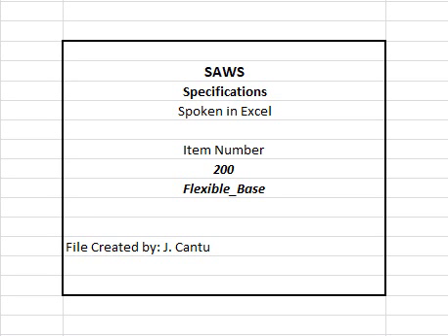200.7 Measurement. Flexible base will be measured by the square yard, complete in place, for the thickness specified in the contract documents, or by the cubic yard, complete in place as indicated in the contract documents. 200.8 Payment. This item will be paid for at the contract unit price bid for flexible base, which price shall be full compensation for all work herein specified, including the furnishing, hauling, and placing of all materials, for all water required, and for all equipment, tools, labor, testing, and incidentals necessary to complete the work.